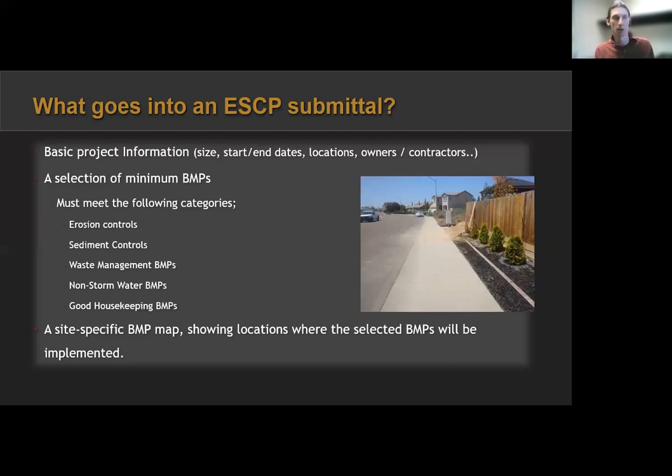So I said, okay, well, let me go on Google Earth and see what that location is, because I think there would be a neighbor there. So when I get on Google Earth, I look, and they're basically going to track through somebody's field, an open field, through all of this exposed soil to take out a fence and then access the backyard of this house. I was like, whoa, none of that was in the project scope. That's another additional 1,000 square feet of project area that you need to consider.